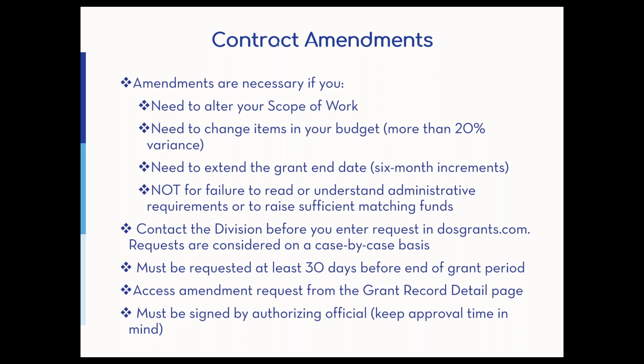So we don't take extensions and amendments lightly. You actually have to have a legitimate reason to do it. If you're like, I just don't have the matching funds and I can't finish right now, I have to raise some more funds, that's not a reason for an extension. You had to demonstrate that you had the funds when you applied. You should still have them.